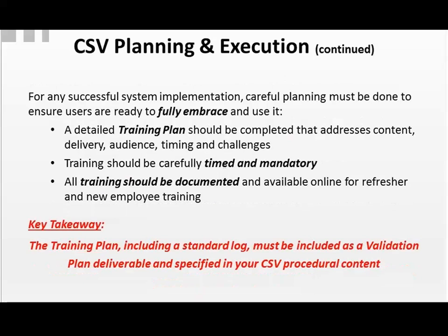Now, for any successful implementation, you have to do careful planning, but you also have to make sure everybody is going to do things properly. You need a detailed training plan, and you should have a procedure for training that's standard in your company. It should also include a training log where you can have people sign off that they've actually attended training. Training should be timed carefully so that you're doing it soon enough that people will be able to understand the system functionality and get used to it before the system goes live, but not so far in advance that they'll forget things. And you want to make it mandatory.